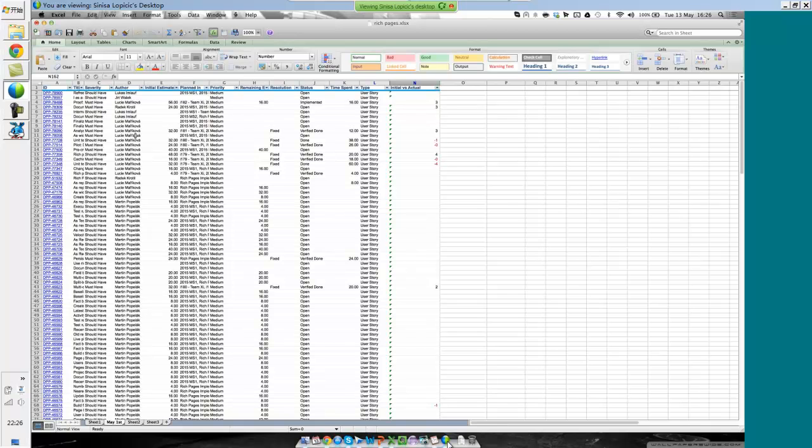And for our estimation, we have mainly three fields that we track, and we have here initial estimate, time spent, and remaining estimate. We actually implemented this, I think, a year ago, and the reason for this is that we're trying to do some, again, post-analysis, as I showed you myself, to try to understand and see if there's a certain pattern to it.